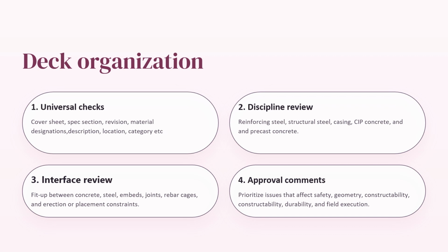There are other things that you will see in the cover page as well, such as the date that it was created. You will see the due date of this shop drawing. You will also see whom you received it from, and you will also see what the status of this submittal is. And according to the priority, you have to do your shop drawing review.